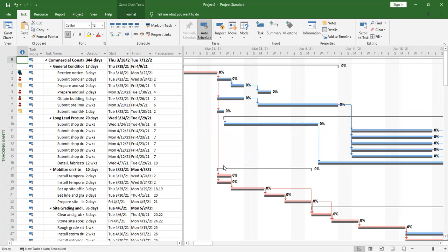Then the tasks that you see in red, those are the critical tasks. It means those ones should never be delayed. In case you delay one of them, even by 1 day, that 1 day will affect the entire project. They have zero slack, and they need to be allocated resources before you allocate to any other tasks because they are critical activities.